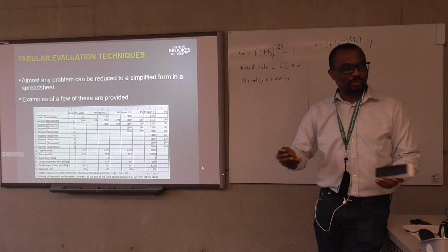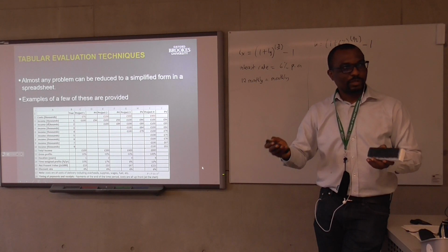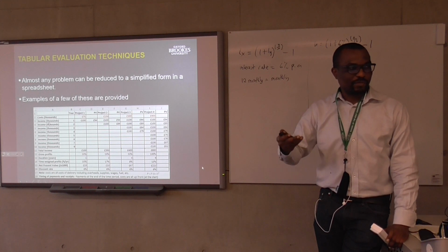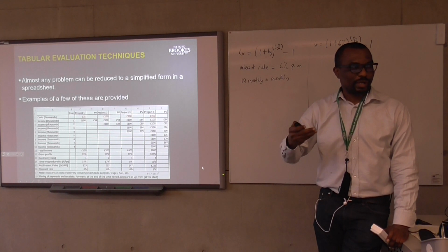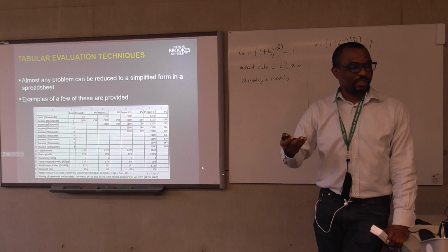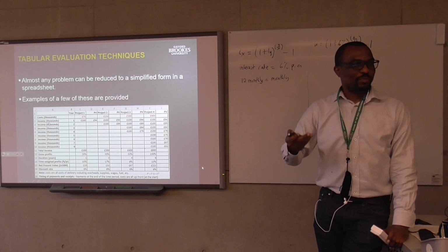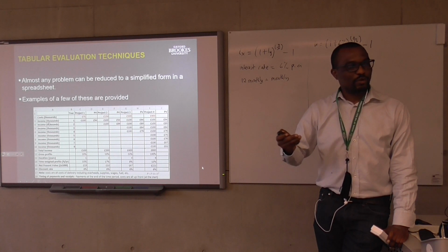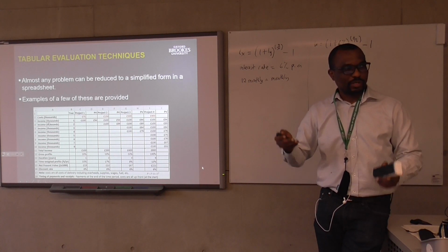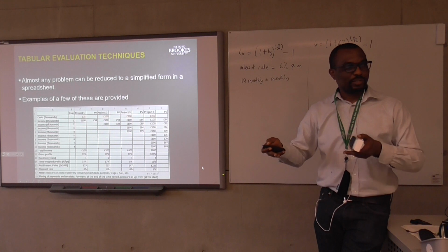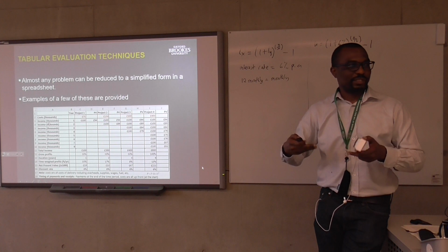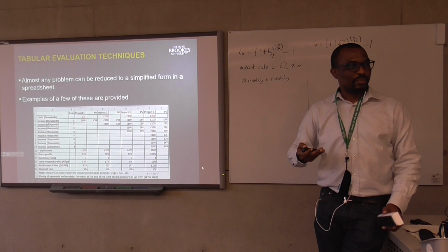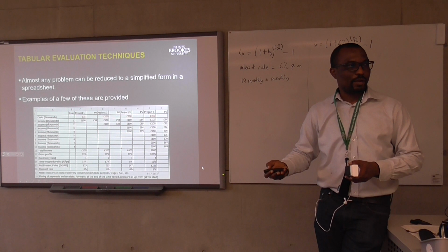Rather than evaluate between 2 or 3 different options, the client has a scenario and you're providing feedback to the client to assess whether the project is profitable or not. And if it's not profitable, what can be done to make it profitable? Possibly it could be that 1 or 2 of those blocks in the project are not generating enough income. So you could advise the client that maybe we should skip that. Or it could be the case that maybe the land cost is too high.